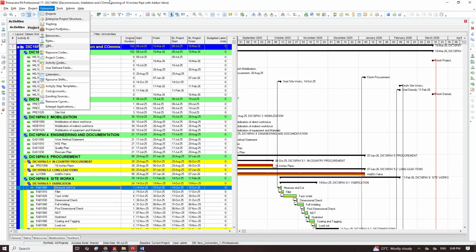If you are in copy of that mail as a planner, we don't play with mail. Anytime mail comes, we have read it, we have responded to it. Since you are not the one replying, you can prompt your procurement team that the vendor just replied to the mail and they should respond to the guy. You understand? But if you are not in copy of that mail, seriously, that mail can stay there for one week. It's only when there is heat that you get back to the vendor, or maybe you locate one of their mails, forward it and ask the vendor, where are we on this? The vendor will reply telling you that there's a mail sent to so-and-so person and he's still waiting for his response, and time is going. So these are the possible ways to track procurement.